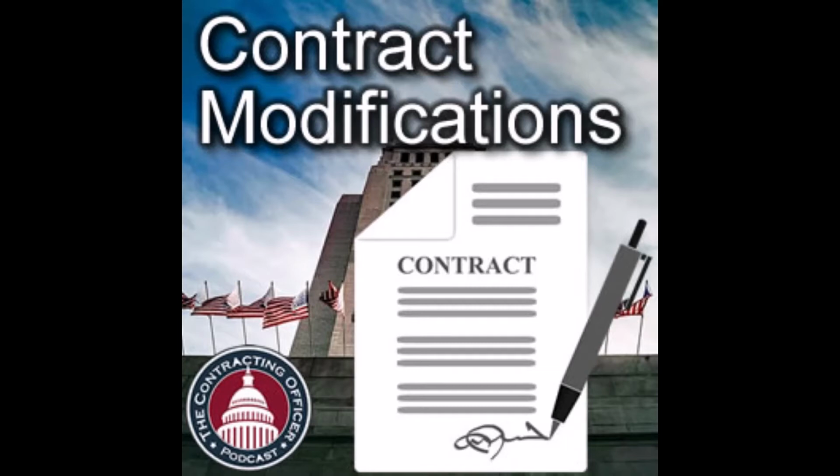And the contractor says, oh, sure. Well, of course, that requires like 8 hours of overtime from somebody. And sure enough, here comes the cost bill, and there's 8 hours of overtime. And poof, just like that, it's an unauthorized commitment. Was it intended to help the government, to speed up the overall process? Yes. But an email would have fixed that. And I'm not saying that the CO is trying to get in the way. It's like, this is the stuff that creates work.